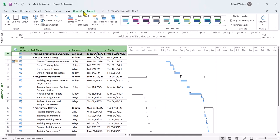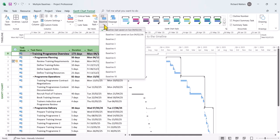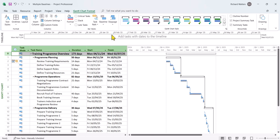So I can turn that off and I can use the new baseline setting. So Gantt chart, format tab, baseline. And I want baseline one to show us the measure now in the Gantt chart. And now we can see the new baseline is under measure from the 4th of November onwards.